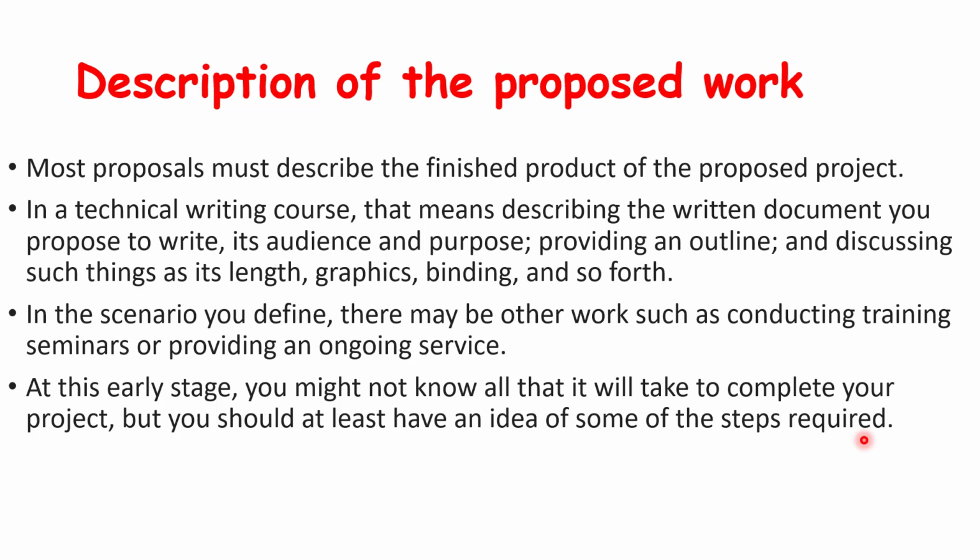You have to list all the processes. For example, you might use welding or lathe operations or anything. And you have to also include all the costs and the time associated to it. So it is quite sure that you will not know how long it will take for sure for exact, but you need to have a crude estimate about it.